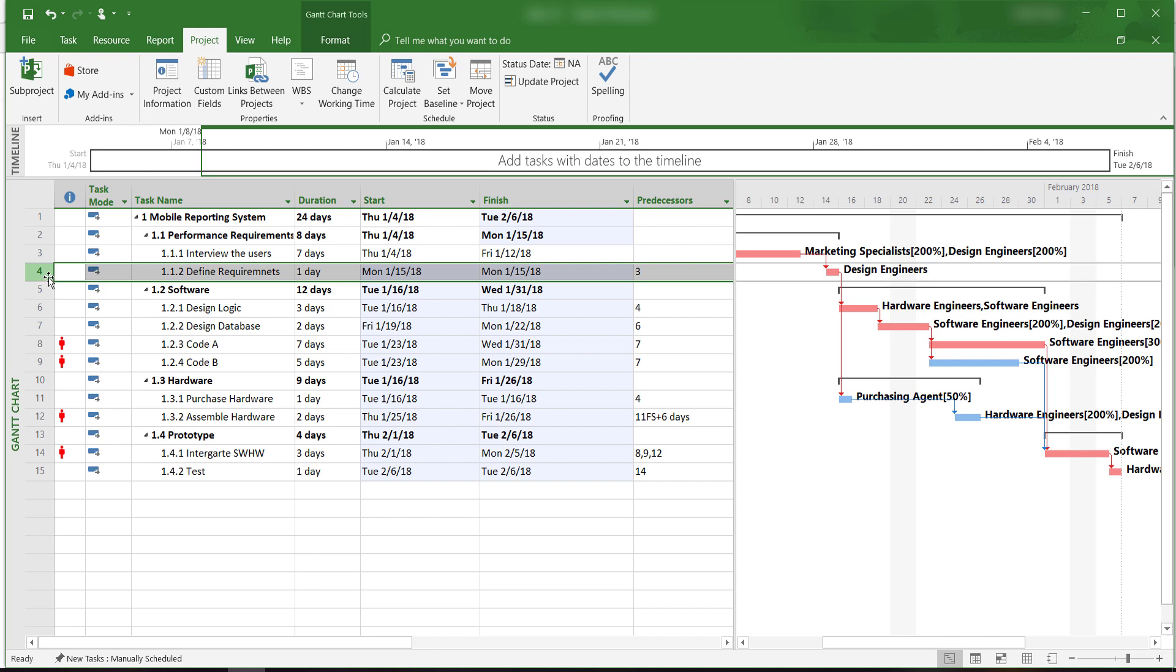For example, Activity 4, Define Requirements, is a critical burst activity. It's a predecessor of Activity 6, Design Logic, and 11, Purchase Hardware.